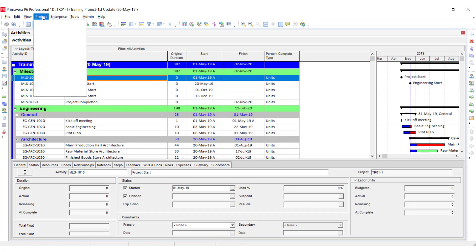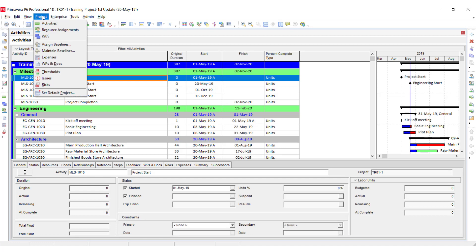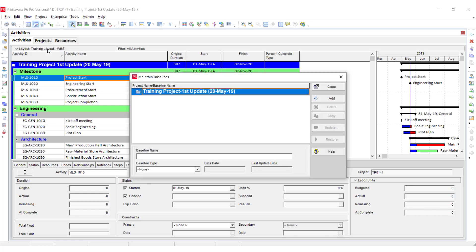Go to the Project menu. Here you can see 'Maintain and Assign Baseline.' First of all, we have to maintain the baseline for the project we are working with. Here you can see the title of the project which we have open — we are going to add or maintain the baseline.